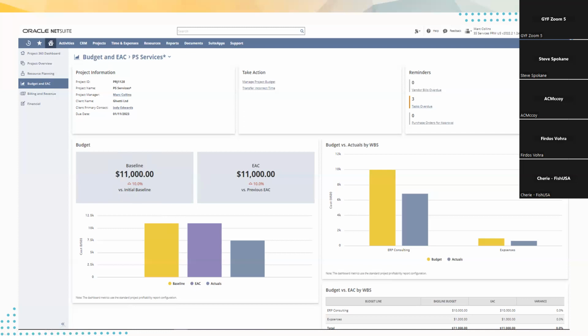Yeah, set as baseline, yep. And then as you go on, NetSuite's calculating the estimate at completion. Now for this project, because again, it's a short one and it's small, these are equal. But if you're on a larger project that's going to span months, you can reset baselines, but typically you set the initial baseline. And then if you reset it, it's telling you what happened here.